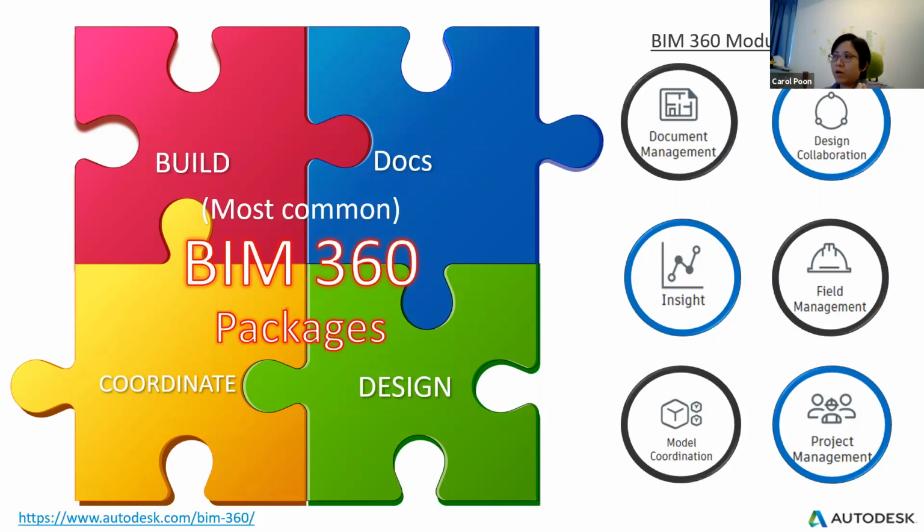And for build, build is actually for the construction stage. So in the construction stage, especially for the contractor, they may need to issue safety checklists, quality checklists, and commissioning checklists. Also, they may need to collaborate with subcontractors, so a subcontractor can submit something via BIM 360 build, and we have some workflow set by default in build. So those submitted packages will be sent to the contractor or the general manager, and then distributed to the architect or engineer, the design consultant. And these 4 packages could fulfill the needs of different building stages.